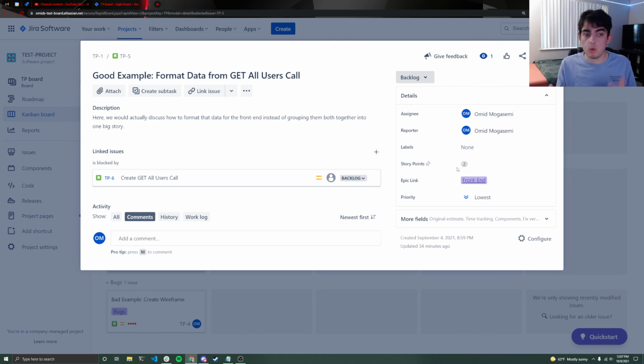And of course, you are not going to be alone in this process. You will be talking with the developers and can communicate with them, like, hey, I think this is 3 or 4 hours. You're the guy doing this story. Do you think so? Is this something where you personally need a ton of research or a ton of code cleanup time? Because if they do, then we can say, okay, maybe we break this up. Maybe we put 2 people on this story. Maybe we just up the story point value so that everybody knows and act accordingly from there.